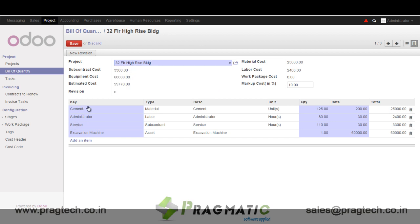In a BOQ, we have the concept of 4M — man, material, machine, and labor — and an optional way of using a Work Breakdown Structure to create work packages, whatever approach suits your project management procedures.